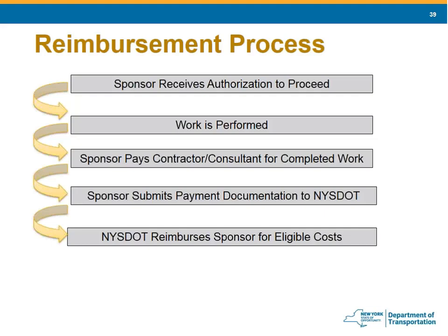To review the total award: the federal share is 80% and the local share is 20%. Local force work, including in-kind work, must be approved by NYSDOT through a public interest finding. If you have any questions about that, contact your RLPL.